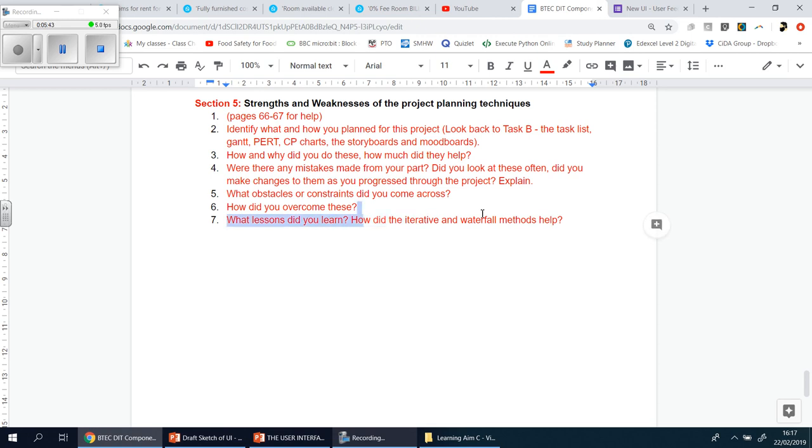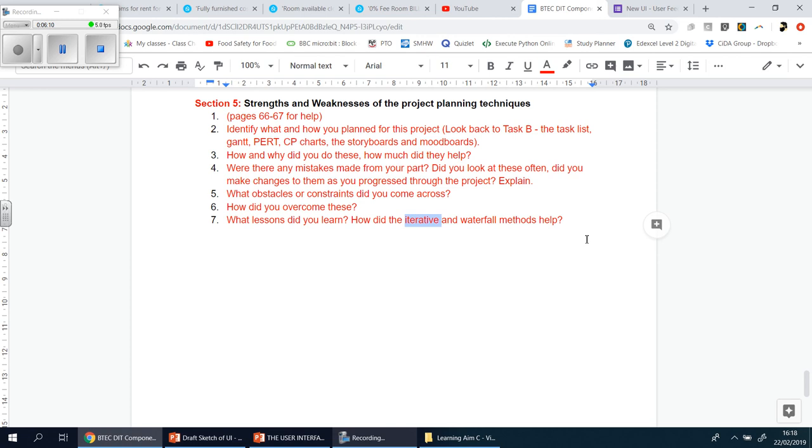And the last thing is, how did the iterative or the waterfall methods help you? So, some of you will have done iterative. Some of you waterfall. Now, between the two, I personally think the iterative one is better. Because it allows you to go back and get feedback and make changes and go round and round and round. But you have to, first of all, understand what those methods were. Most of you will have done the iterative, if you've followed my videos especially. The iterative method is where you go back on yourself to do something before you go on any further. So, in this case, you made your first UI. You gave feedback. Then you went back to fix the UI before going back to the client, which is Drews in medical practice. To say, here's a final product. That's the iterative. Waterfall is when you do one thing, then the next thing. Step three, then step four, then step five, and so on and so forth. But there's no backwards. Because a waterfall goes down, doesn't it? In the real world. The real waterfall is water from the top going down to the bottom. Which means there's no back steps. There's no steps where you go backwards and make some changes. Whereas iterative does.